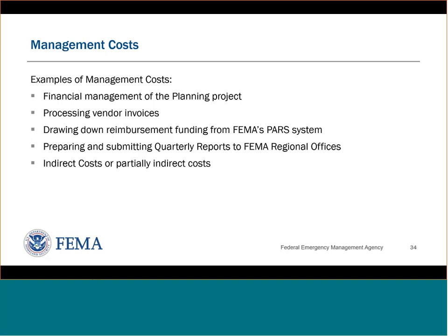These are really more of the common management costs that we see. We do get a lot of indirect cost questions. And management costs, whether you're doing a separate management cost sub-application or including management costs in your sub-application itself, it's really important to note those percentages. So 5% in an application, and then 10% as its own sub-application for management costs.